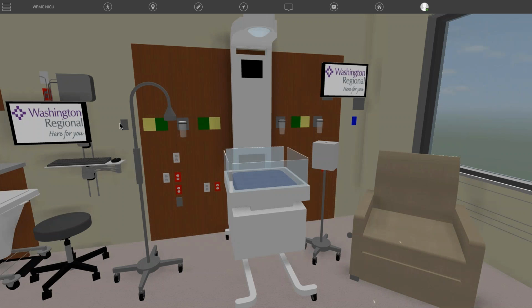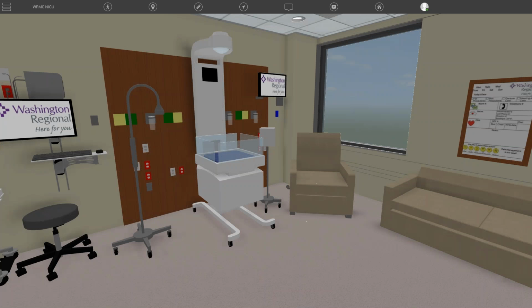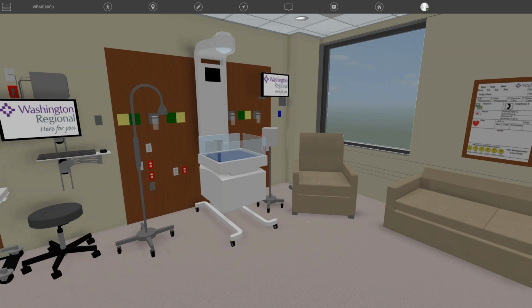Now, my benefit, Robins and Morton's benefit for this, is to not have to spend the amount of time. I mean, this one took me about a day. So you have one person spending a day building a virtual mock-up versus a crew of 6, 8, 4, I don't know how many people spending a week or whatever to mock this up physically.